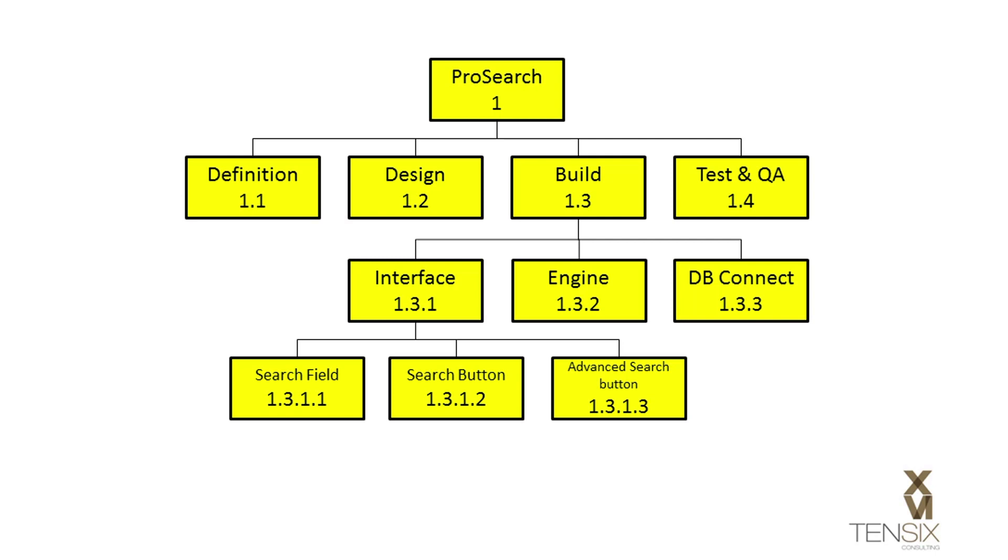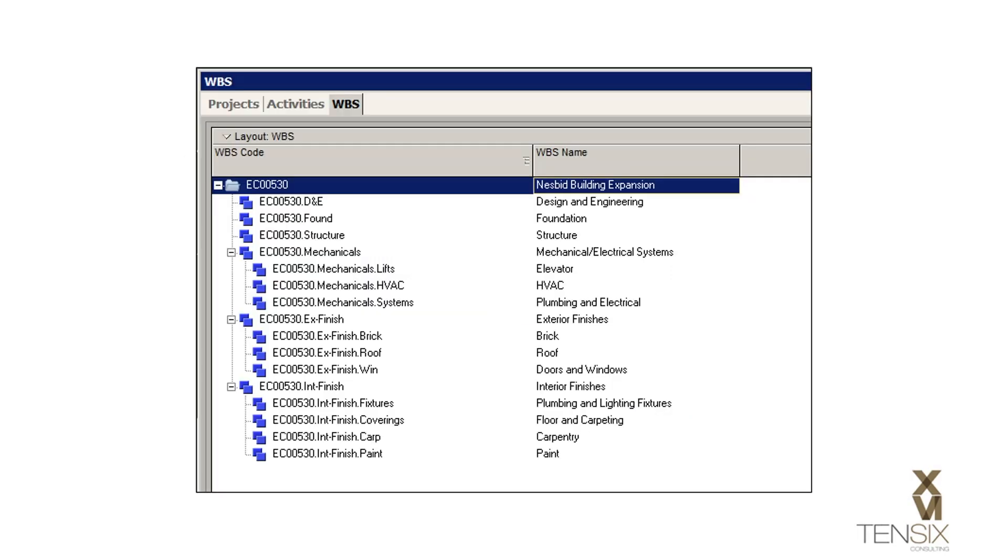You need the WBS sufficiently detailed to give a full account of the main deliverables for the project, but not so detailed that WBS elements start to represent activities at the lower levels of the structure.